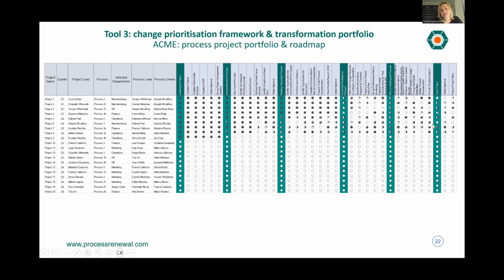And then on the right-hand side, this organization is quite mature, and it has a BPM process improvement methodology, quite disciplined in that. In each column, I have the phases of improvement projects. First, it starts with understanding the project and its steps. You have the charter for change, the scoping understanding, the agreements to proceed, and sign off from the executive or the sponsors to proceed.